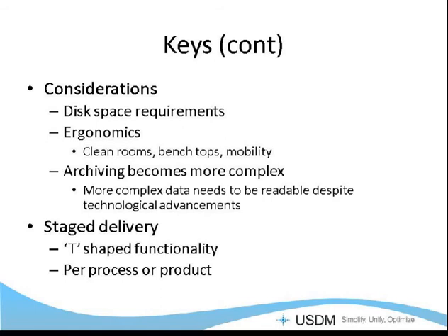Some things that have helped me is what I call a T-shaped functionality implementation. Basically, this means you implement a high level of the entire system without going very deep into the functionality of each area. So get the basic system in, and then as you go along, you might add in calculations. You might add in spec pulls from LIMS. You might add validation of result entry. You might add sending out of results to LIMS, but the basic functionality gets in there first, and then in stage delivery, you add deeper and deeper functionality.